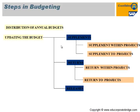If the project has started and budget is nearly exhausted, a supplementary (add-on) budget can be raised using specific SAP transaction codes. Once a project or WBS work is completed, the balance budget is returned from the system as a return budget. In practice, the cost planning is done by the project engineer, the budget is set by the project manager, and the Chief Finance Officer releases the budget — controlled through SAP authorizations.